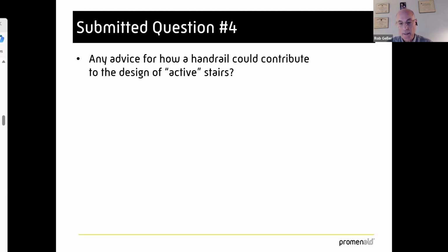Typically, from the time we get the purchase order, call it a residential job, even if they're anything from 2 feet to a couple of 100 feet, those can be done in a couple of days, and they're shipped everywhere in North America. Over a certain size, they go by transport, by ground, so it's 3 to 5 days transit. But anything under a certain amount of weight, say about 200 pounds, goes 2-day FedEx air.